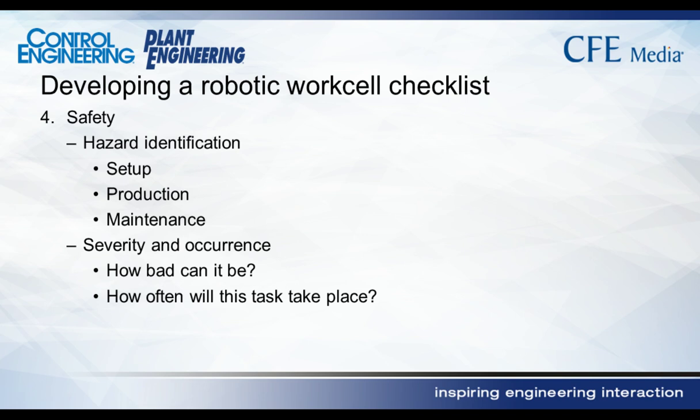At this point, defining your safety risk and remediation plan is important. There's a very good document, the RA 1506-2012 standard, that helps you understand how to perform a risk assessment. There's companies that can help you with risk assessment, but one thing I want to stress is that the end user is responsible for the functional safety of a work cell.